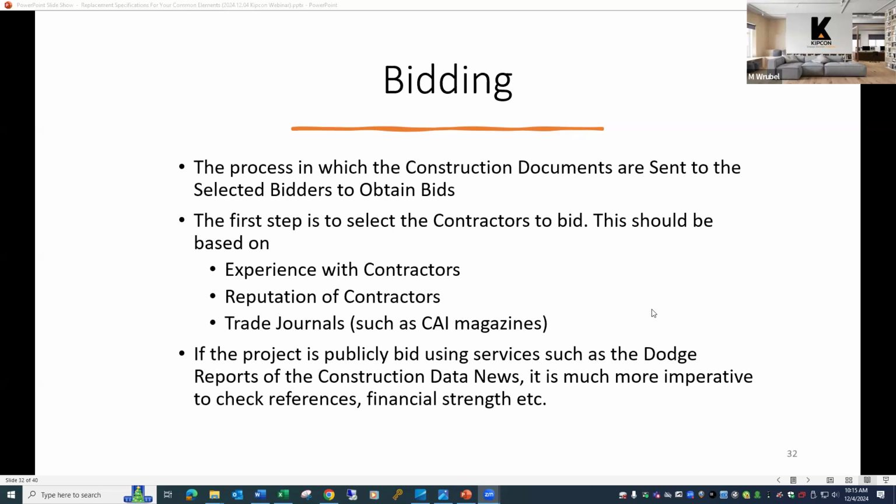So when you have formal specifications and a bid form prepared, all the contractors are bidding on the same items, and you can look and you can see, why is this contractor's price so high? Why is this contractor's price so low? And any various forms of questions can come out of looking at that summary. So it's very important.